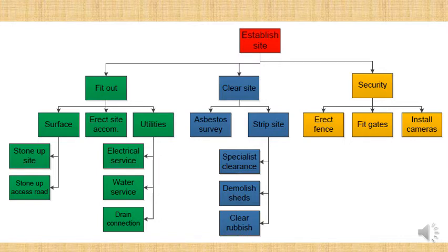So those were the different work packages, and those were just titles, but with each of those little boxes I actually did eventually assign a little bit of a budget for each one, who would be responsible for achieving each project, and also I gave a schedule, a date when they could start each work package and when they must finish it by. And I also gave this work breakdown structure to everyone in the project, just so that they had a clear understanding of what needed to be achieved.